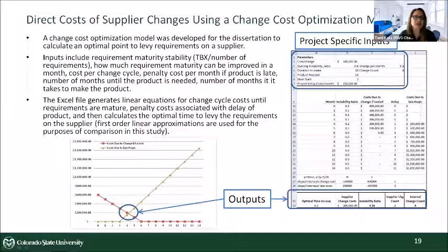All right, and the last measure I used was change of suppliers, cost due to supplier changes. In particular, there is this sweet spot. If you put a supplier on contract too late, they might not get their product done in time, and your project will likely incur some costs associated with that, whether it's the costs associated with your overall project being late, or trying to speed up work later and compress your test time, or maybe you've got some penalty costs associated with your ultimate customer. There's ultimately some impact for having your supplier deliver late.